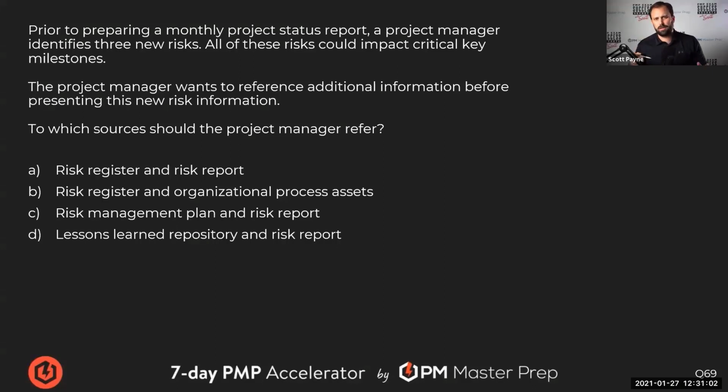Okay, so like a snapshot saying, hey, we have 212 risks on our risk register. We got these new ones that came on. We got these old ones that we satisfied and they're no longer a problem. Here's how much money we spent potentially with all the contingency and management reserves. Here's the next couple risks that we're keeping our eyes out on. Here's what we learned with the risk responses that we've put out there. Just a summary of the overall risk landscape, if you will. You agree with that, Eric? Yep. Sweet.